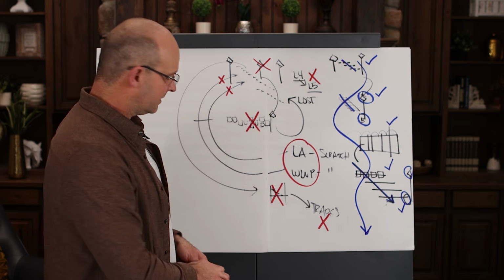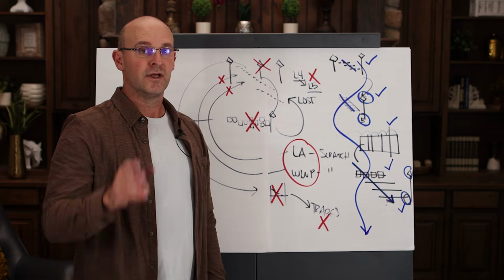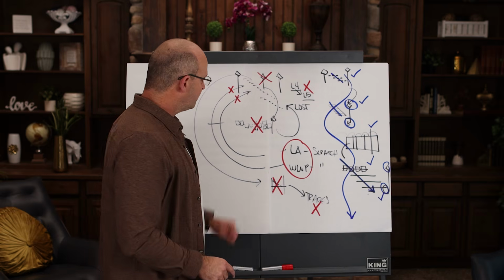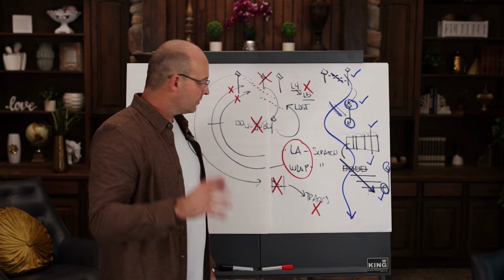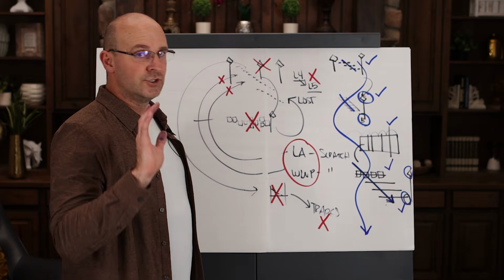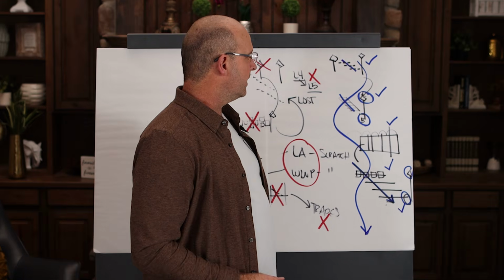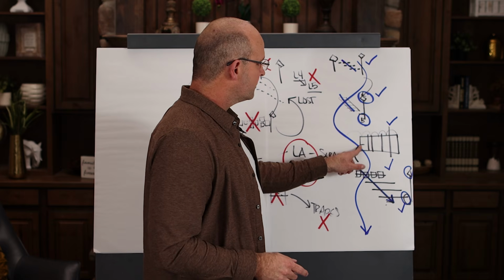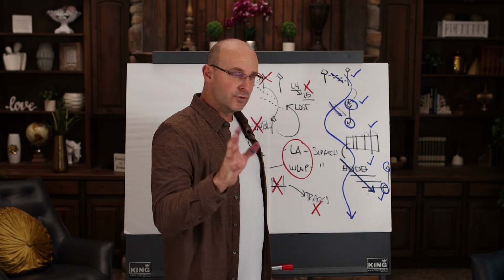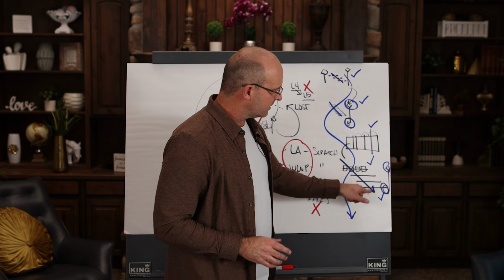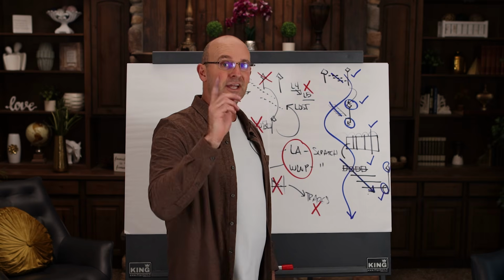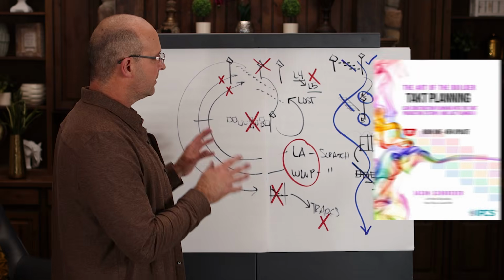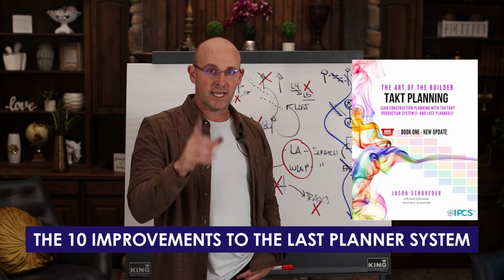So let me just highlight this. If you're like, J Money, you talked about a lot of stuff. Don't use CPM milestones. Don't pull plan large batch areas. Don't recreate the look ahead and weekly work plan. Do use tact milestones. Do pull plan according to the right zone size just by zone. Do compare your pull plan sequences zone to zone to zone. And do gain buffers.